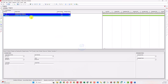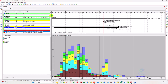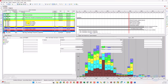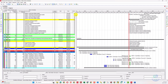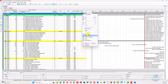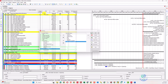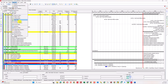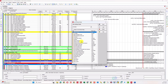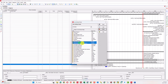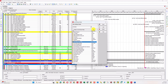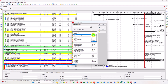I will go into my schedule and open it. First, I will create one user-defined field in Primavera P6. Let me adjust the layout and add the schedule percent complete and performance percent complete columns. In the user-defined field, you will create a number-type column.